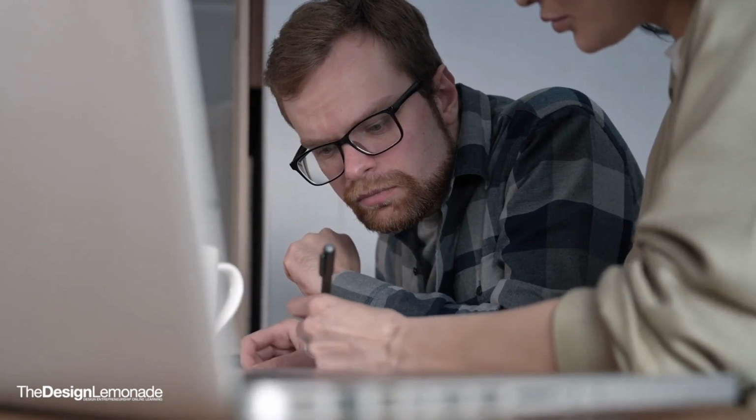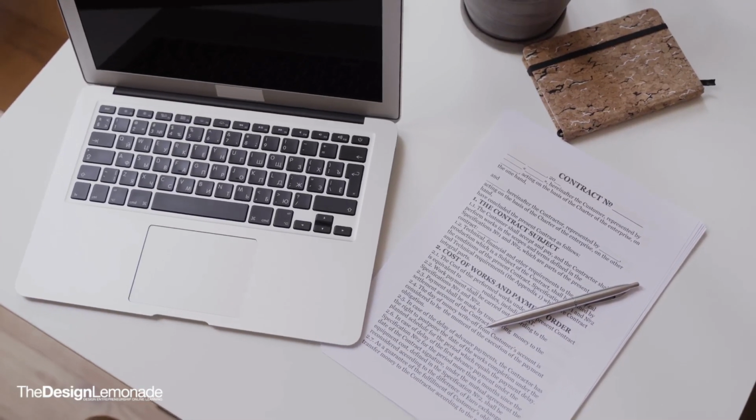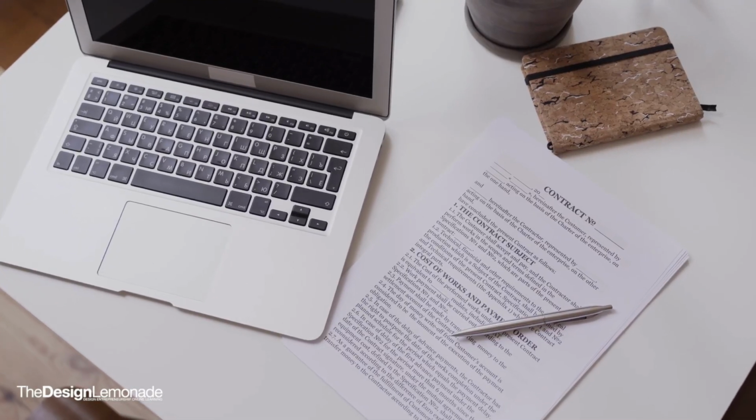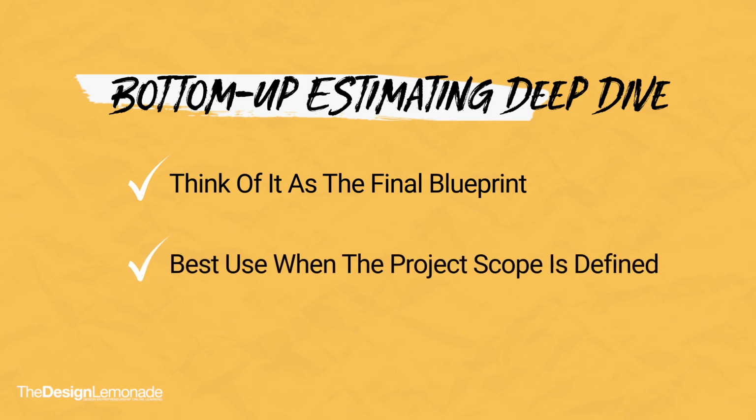This detailed approach leaves very little to chance and is the gold standard for creating precise, comprehensive, and highly defensible project proposals. The best time to use bottom-up estimating is when the project scope is well-defined and you need to provide a final, binding quote.